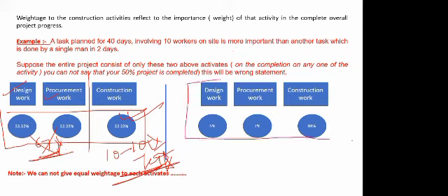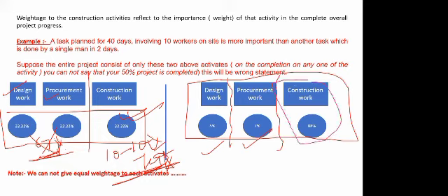You need to think about कि किस तरीके से आपको प्रोग्रेस देना है। Pre-construction activities हैं, they will obviously have less weightages. Design work will be 5%, procurement you can give 7%, and major thing construction work will have 88% progress. Now, at this stage, if I ask, you'll say the total overall percentage progress is 12%, and it sounds pretty well, right? Okay, ठीक है, अपनी इन चीजों को include किया है तो progress इतनी हो रही है, right?